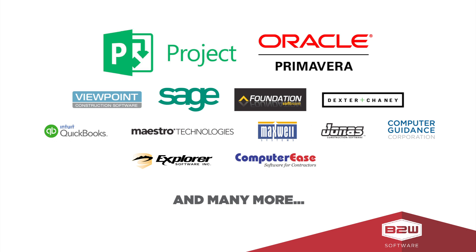Estimators and PMs can spend many hours or days creating schedules from scratch. By leveraging B2W's ability to export an entire estimate directly to Microsoft Project or P6, you can dramatically reduce the time and effort needed to make a schedule.